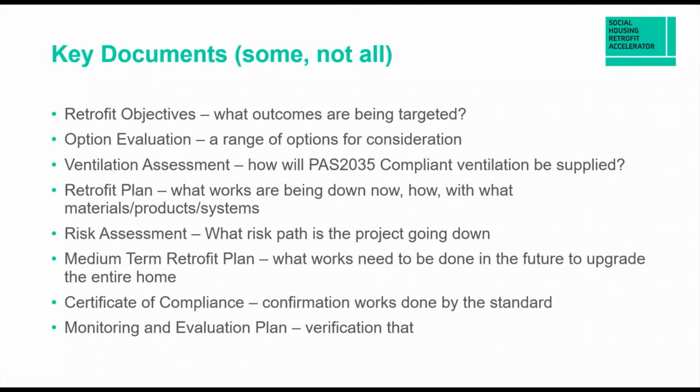The retrofit plan, what exactly was going to be done, how, with what materials, products, and systems. So that's the overall kind of strategy for the retrofit. The risk assessment to make sure what risk path the project is going down, and to identify what key details and specifications need to be coordinated.